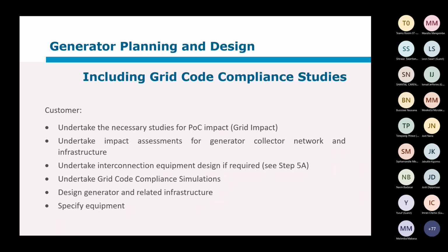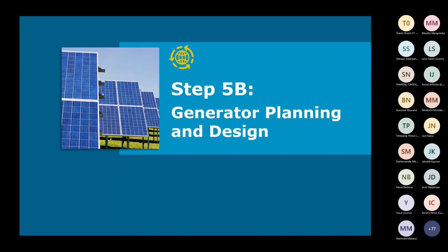Sorry, Kara, I just want to make sure we didn't miss any of the questions, unless it's going to be covered elsewhere. So I see here, Manalisi asks: is there a separate cost aligned with the submission of a COC post-installation of the equipment? So once the installation is done and there's work that needs to be done afterwards, I think the answer would be that it would be an all-inclusive cost. When you give a budget quote or cost, it would include everything that needs to be done up until handover, including COCs and commissioning and fine-tuning and so on. But Gert, you could confirm that.